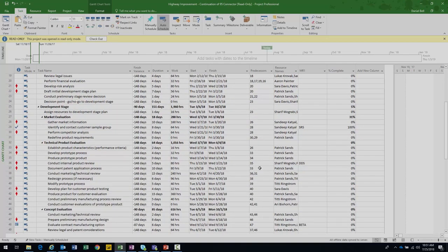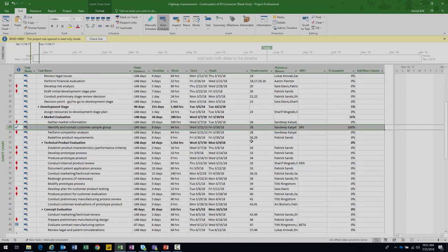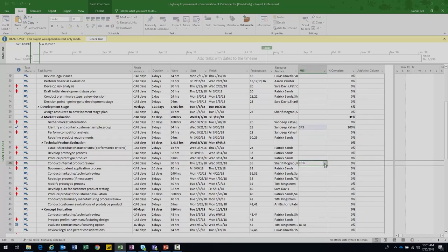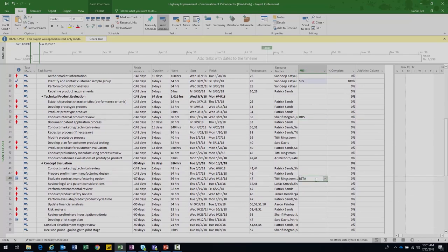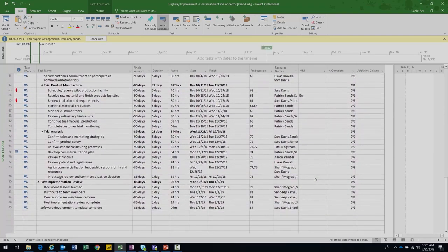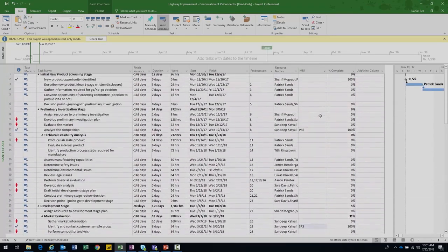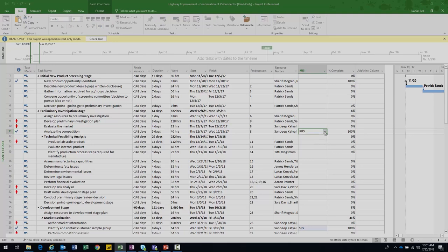Okay. Down farther, you can see this one at row 29. I assigned that my SRS milestone. Okay, there's my DDS milestone there, and so on and so forth throughout the project. You really need to avoid assigning the same value to more than one task here, because the tool is only going to calculate the value for one of them. So you just assign one milestone per task within this project. Now, there are other fields required in the system to make these calculations show up at the project level.